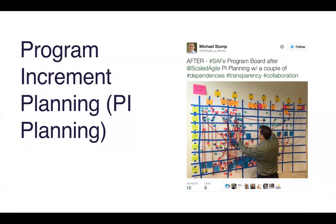At a very high level, PI planning is a two-day event which sees all members of an Agile Release Train — a team of teams, a cross-functional group — come together to plan out their next program increment. A program increment is often a quarter, or more prescriptively about 10 weeks of work. In this session, a product manager sets the vision in the shape of top upcoming features, then asks the teams within their program to identify and plan the work needed to support those features.